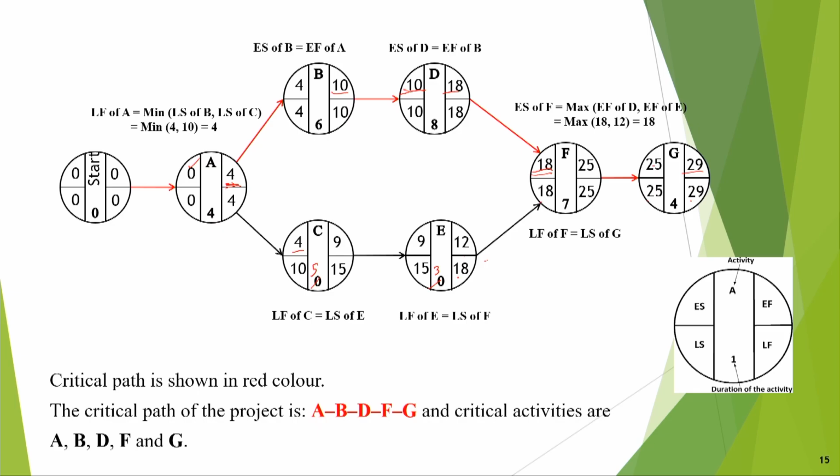So this 18 will come here, and of course 18 minus 3 is 15, then 15 will be here, 15 minus 5 is 10, so 10 is here. Now you have to see that two arrows are going out here, so you have to complete this path first.